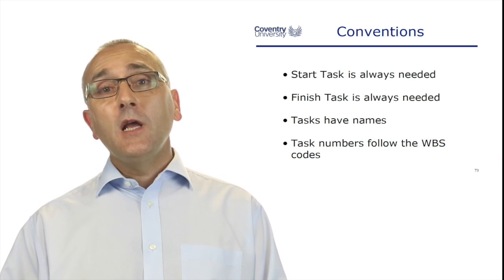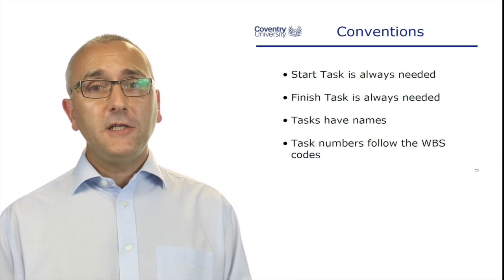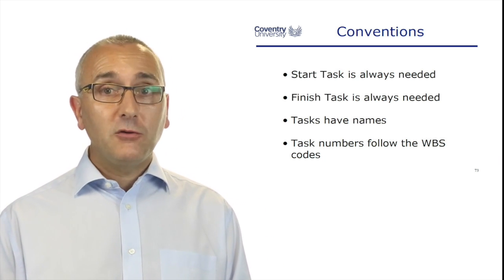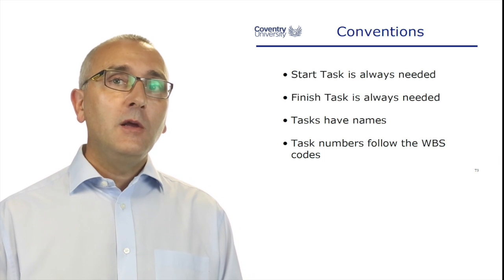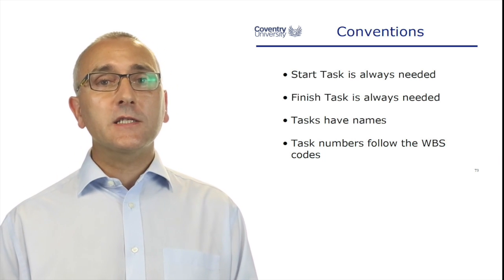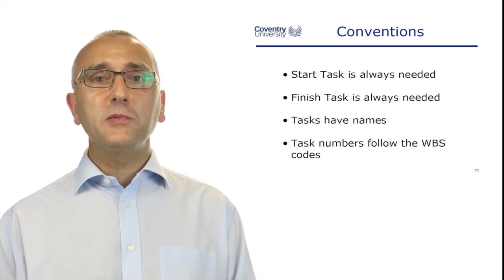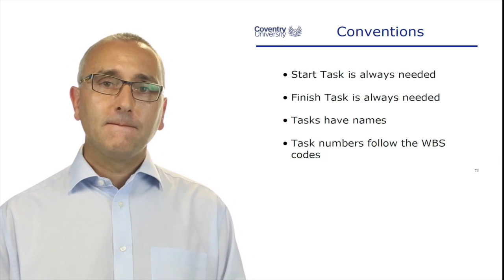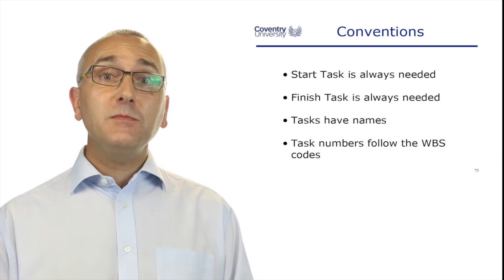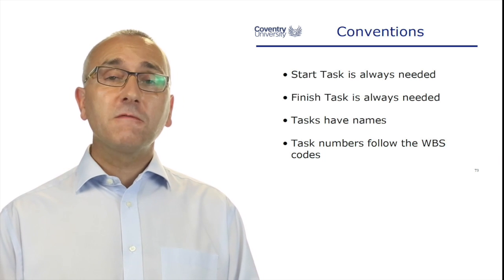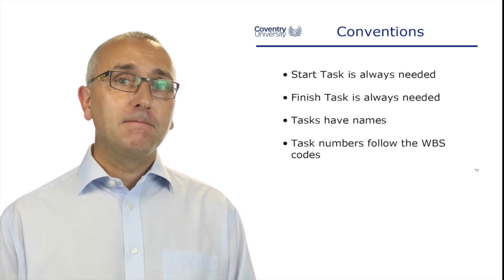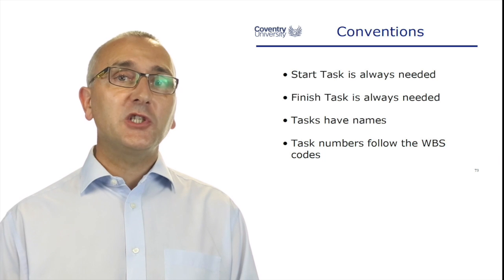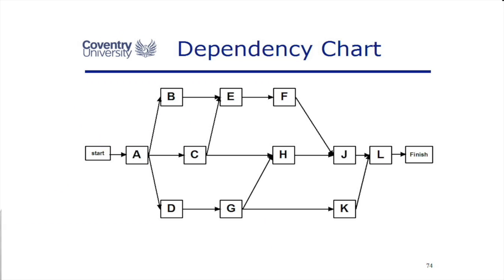A couple of conventions: have a start task and a finish task. I will have a look at an example in the next video clip, but a start task and a finish task makes it clear that there's no loops and there's no dangles, so you know exactly which tasks you've got.